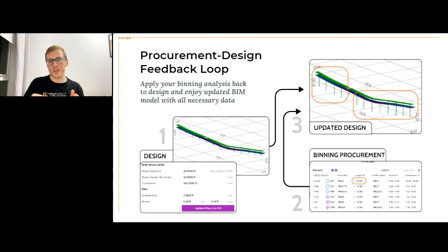And what's happening on the procurement stage is that procurement engineers do binning, basically. Sometimes it's a procurement engineer, sometimes it's a mixed structural procurement engineer, but basically they start creating fewer classes of piles, for the sake of the project being easier to build, right?